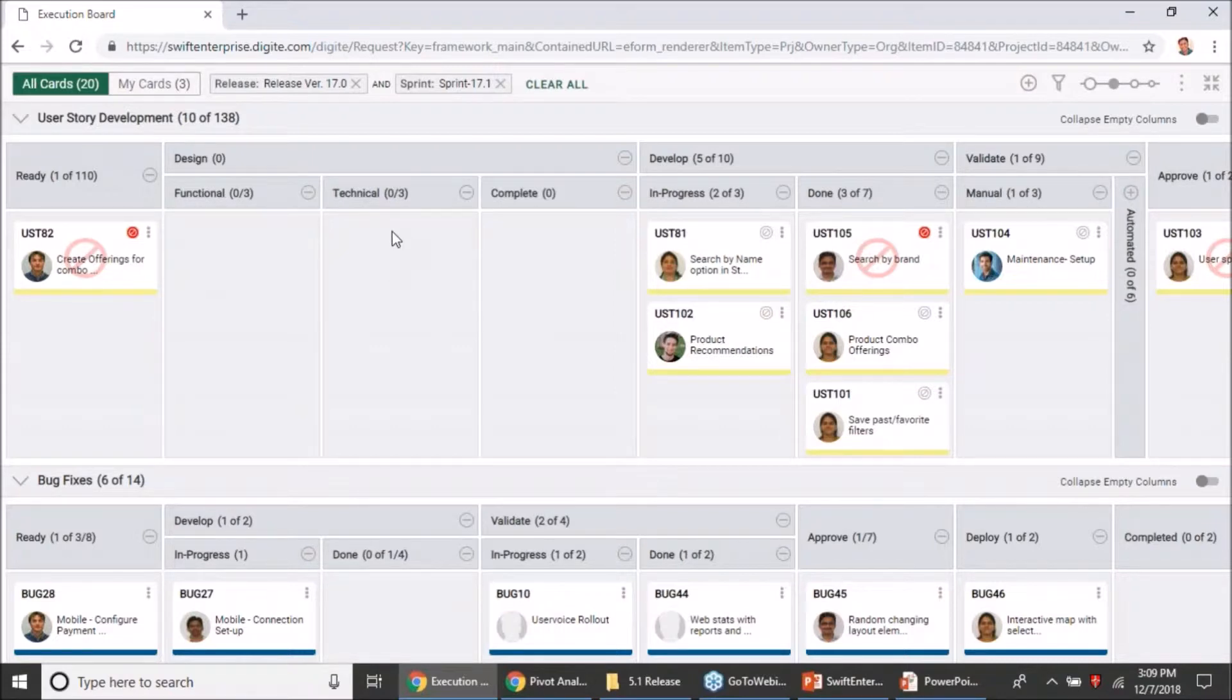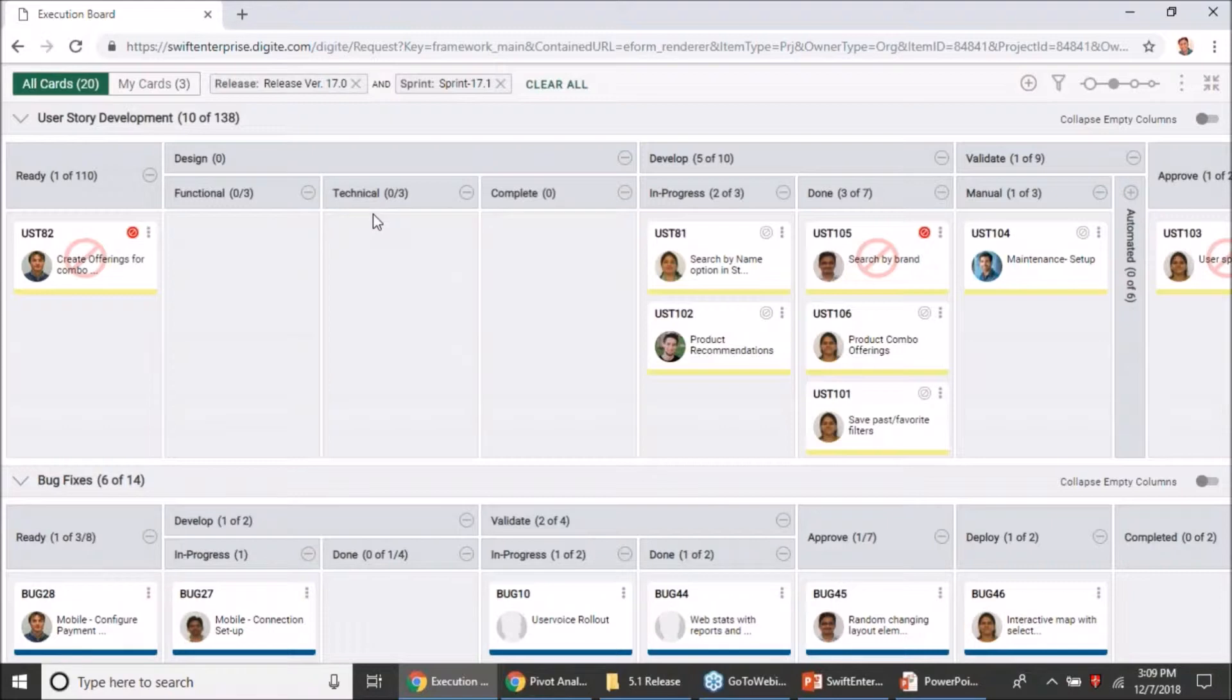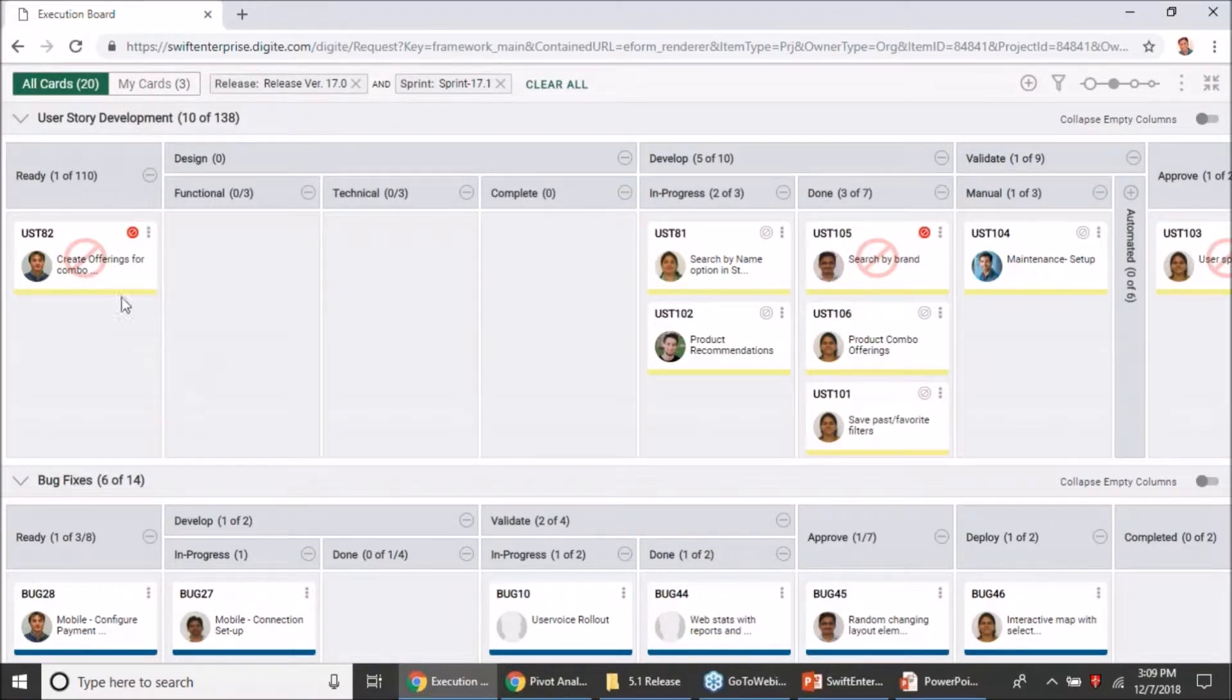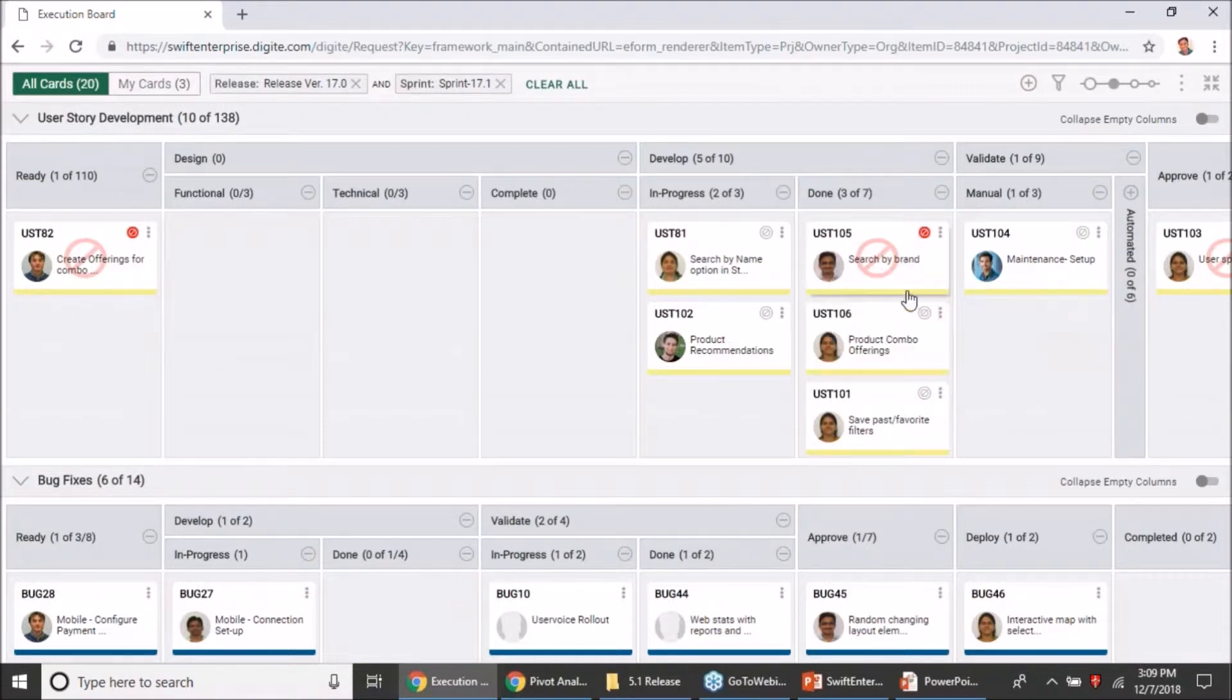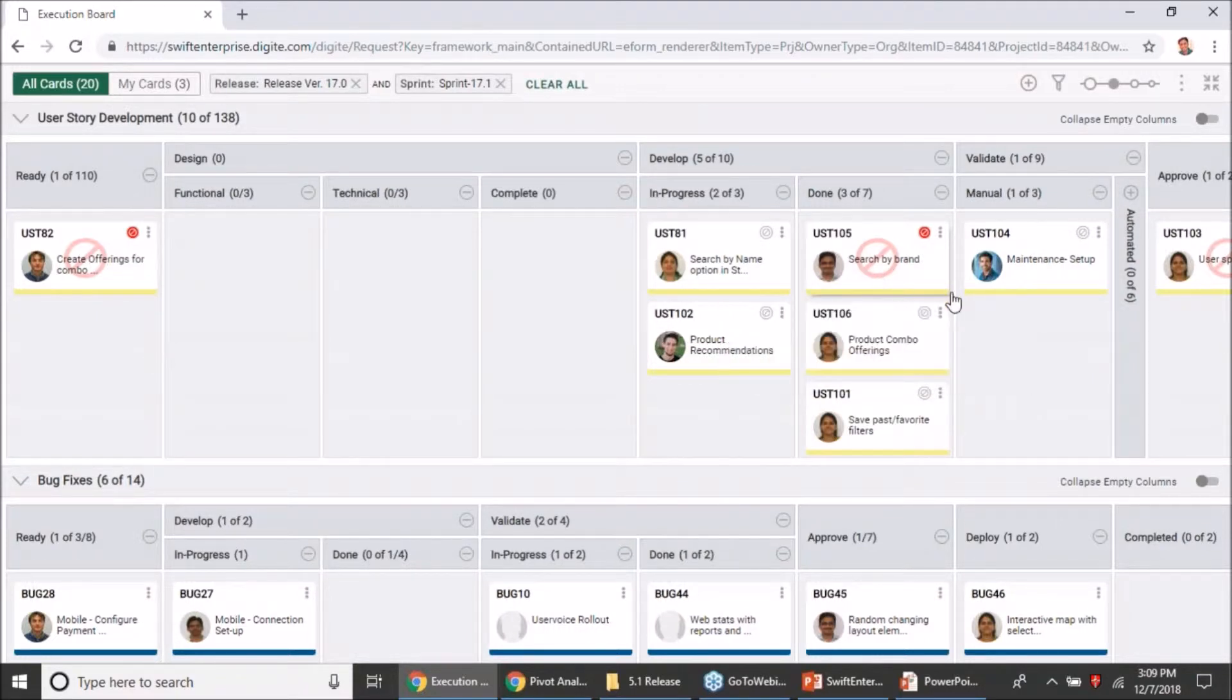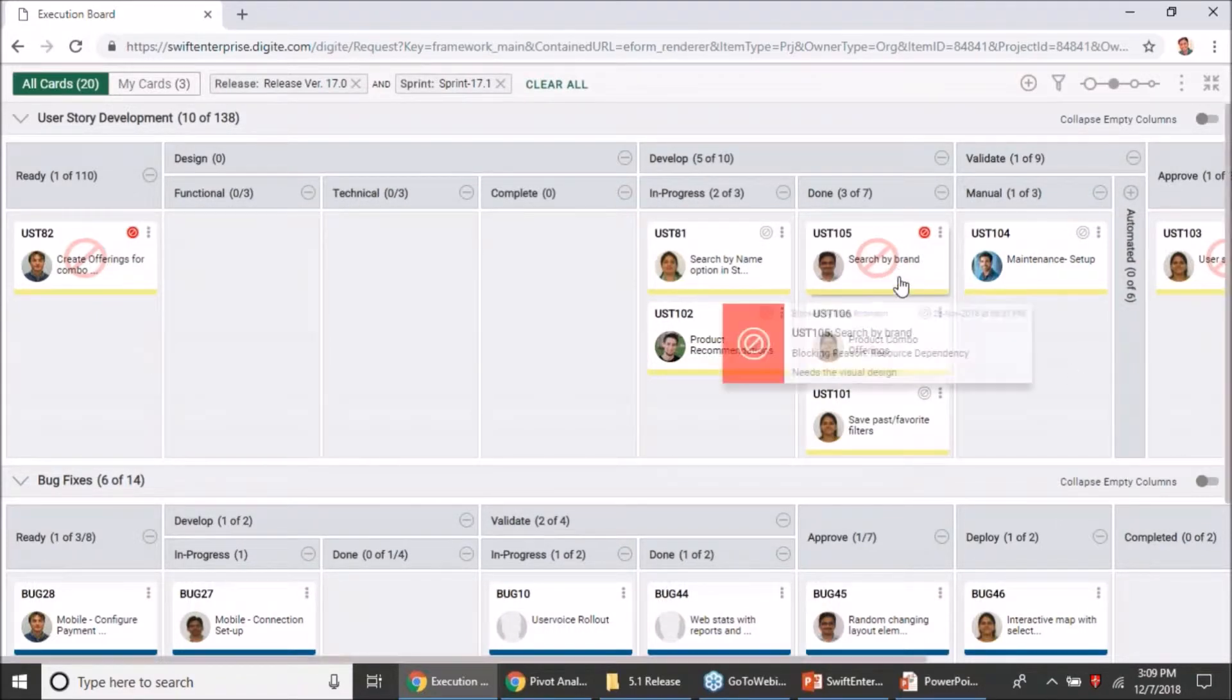That's how easy it has become to work with your execution board. Coming back to the enhancement related to blocks, one thing you may have noticed is that the blocked cards are now much more apparent. If you have blocked a card, it will come across much more easily and the moment you hover over it you will also see the reason and the comment provided by the user who has blocked the card.